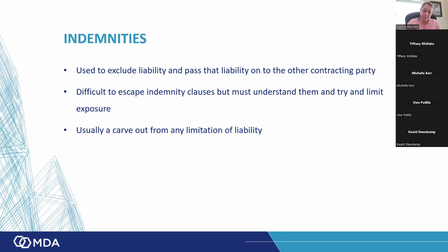So you would say, listen, I'm submitting my tender, but I'm making these qualifications. One of them being, you've provided no information on the surrounding communities. We could not access the surrounding communities to figure out who the chief is or the CLO or whatever it is, and we would require the ability to do that. And if there's a change to our proposal based on this, then we want to be able to get additional time or additional money. So you would actually put it in your tender proposal as the contractor if the employer hadn't dealt with it.